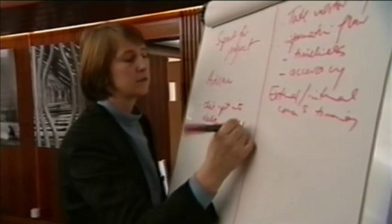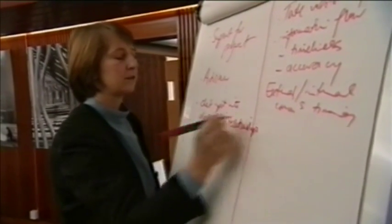From where I'm sitting, the building design continues to change. We haven't finalised sufficient elements of the building that we should have done. We're going out to serious tender in the new year. The information isn't there necessarily as it should be. And I want to start on time, and it's a big worry.